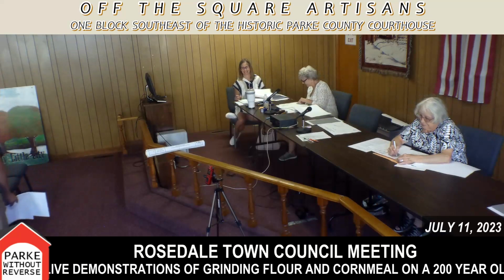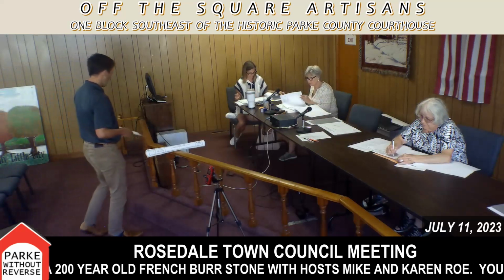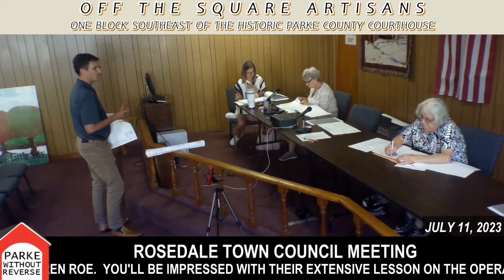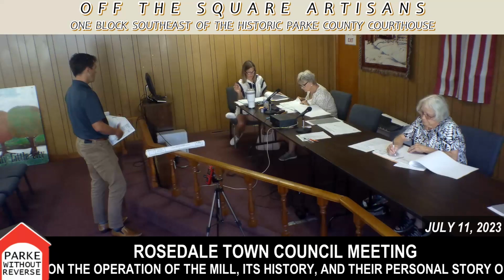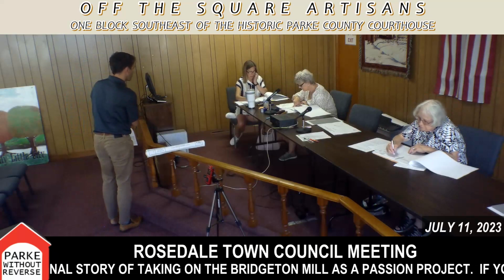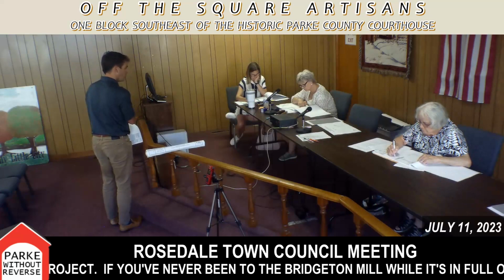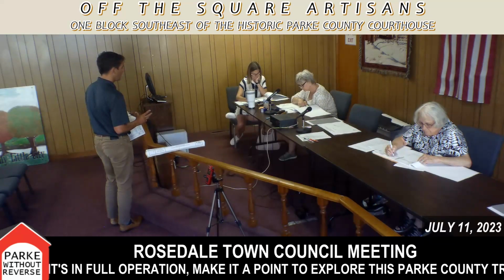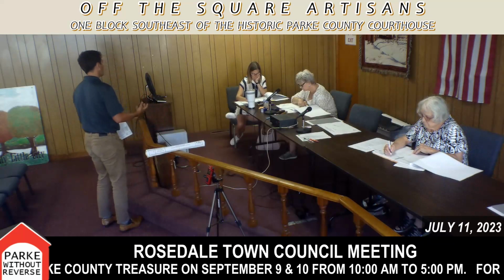Okay, so then our current location was laid out in the alleyway, just going kind of right where I had the old GIS line. So it looks like it needs some tweaks to get kind of toward the center of the alley in some locations. What are you on, PP2? PP1 still. Okay. So you can see on PP1, there's kind of a garage structure really close to the storm sewer. So we will have to move that more toward the center of the alley to avoid those kind of conflicts. So there will be some still east-west play, I think, in the storm sewer to get it exactly where we want it and avoid as many conflicts as possible. But I think we're in a good preliminary location to be able to show you.